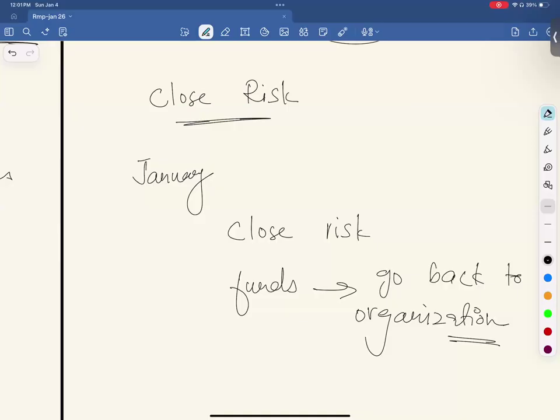Absolutely. When a risk has occurred, you have responded, the effect is mitigated, then the status would be updated to closed, right? The response is implemented and it is closed, and there is no further chance. Then you close it. Okay. Correct. So all the risks at the end have to be closed, right? Yeah, that's right. Absolutely.